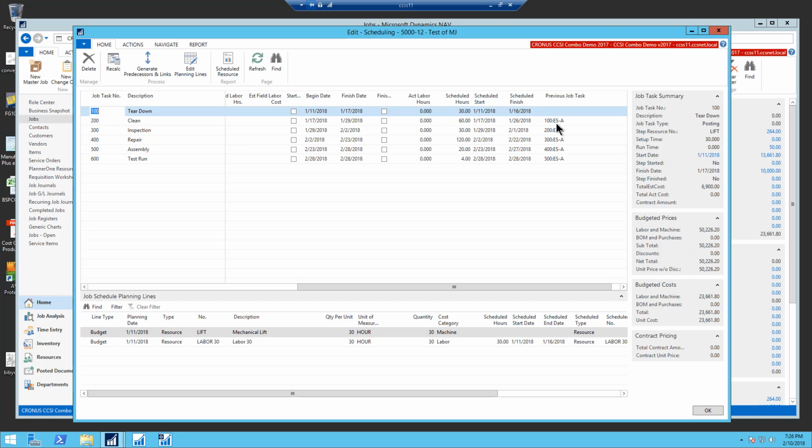The ES stands for end-start. So it's an end-start relationship, typical, you know, when this one ends, the next one can start. And then the -A means it's a strict link, so that if one of these tasks should get delayed, the successor task will be pushed out in the future as well.